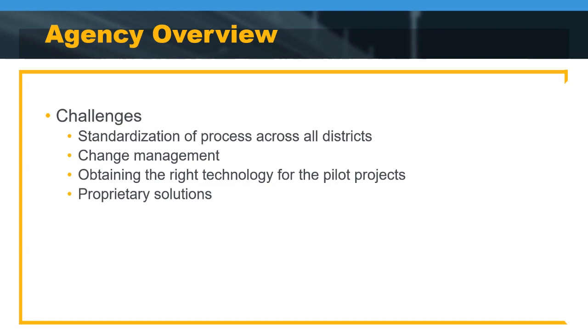The next one is really trying to manage that pace of change. We're trying to take those small steps to look at the various use cases to advance this initiative. But we do have a very aggressive timeline to meet. That 2025 is going to be here before you know it. So we try to provide as much technical support as we can through all of these pilots. In each aspect, we look at providing at least 3 to 4 pilots per area that we're testing. That way we have fallback plans because of that aggressive time schedule. If one happens to be delayed, we have backups for those issues.